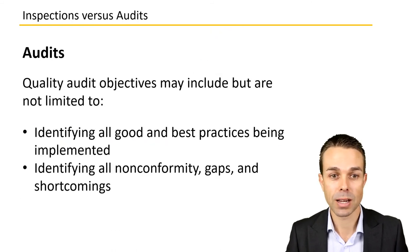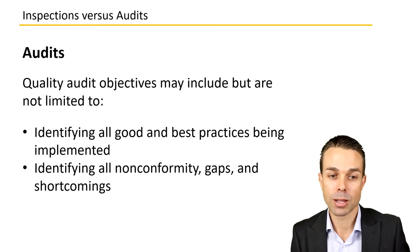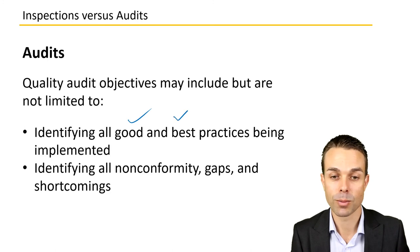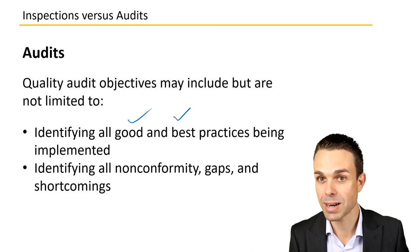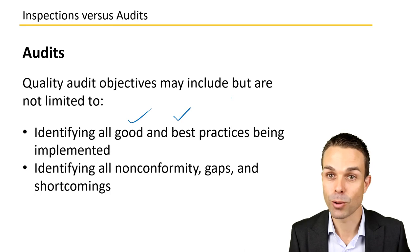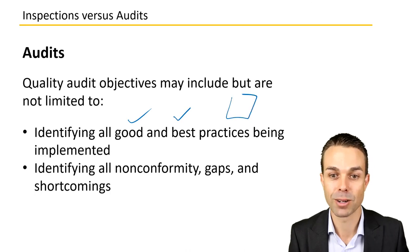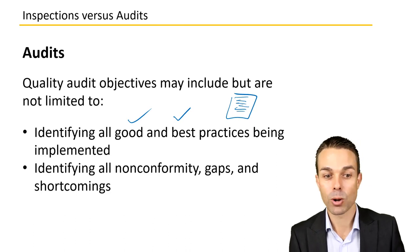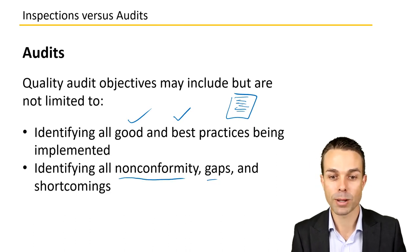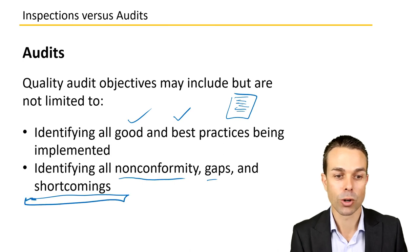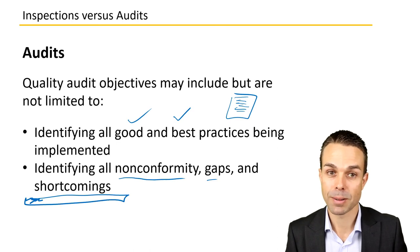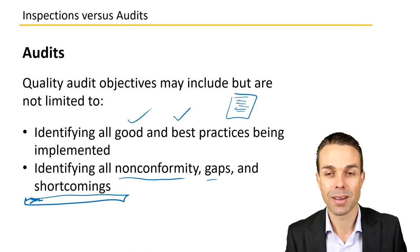Some examples — audit objectives may include, but are not limited to, identifying all the good and best practices being implemented. For example, they could recommend following the PMBOK Guide as one of the best practices in the industry. They are also identifying all non-conformity, gaps, or shortcomings — maybe there are gaps in the way we're delivering or gaps in the product we are delivering — and all those can be called out by auditors looking at how our project has been delivered.